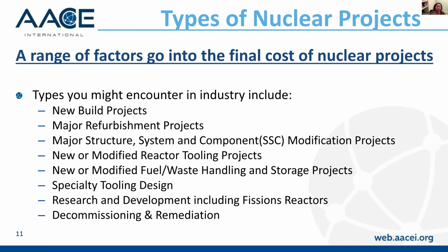When we're talking about modifications, and I'm probably preaching to the choir here, we're talking about projects that intend to change the form, fit, or function of that system, structure, or component with such significance that we have to have a design package. So what we're not talking about is a project where we're changing out valves or something where essentially we're looking for item equivalencies, or projects where we're disassembling a turbine for rotor rewinds, as in the case of a maintenance program. So any projects where we might have inspect, calibrate, clean, swap, or test in the scope is also not really the type of project we're considering in this RP.